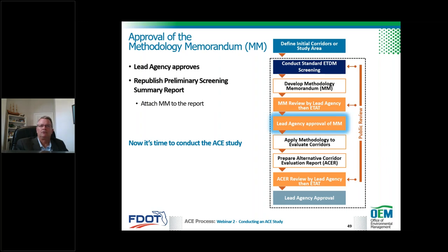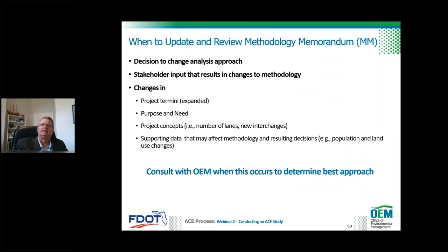So as we're moving toward approval of the methodology memorandum, when the lead agency itself, which might be you, is comfortable with the document contents and quality, then the memorandum is approved. And so then your district ETDM coordinator would republish the ETDM preliminary screening summary report that has the methodology memorandum attached. And then that essentially completes this step. And so now you have a solid and pre-coordinated plan in place, and now you're cleared to conduct the ACE study. So let's talk real fast about situations that come up with the next slide here.